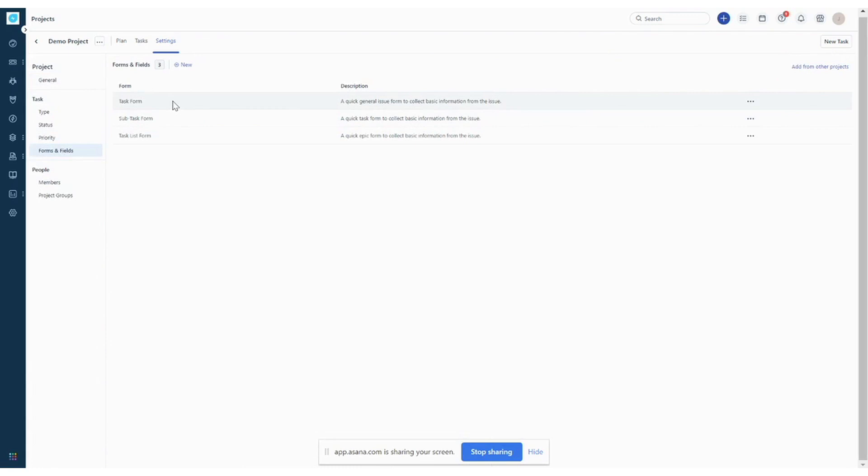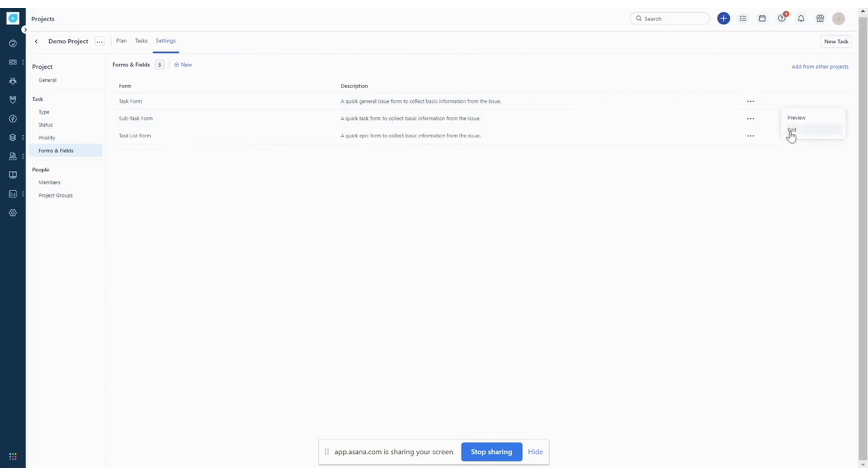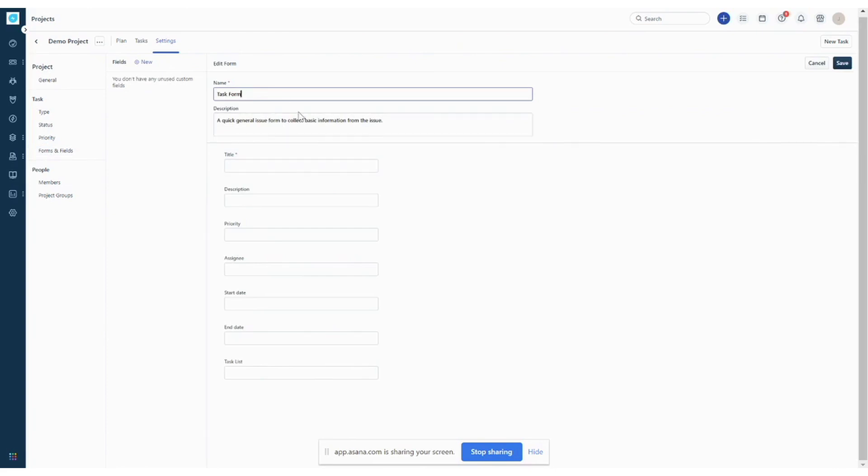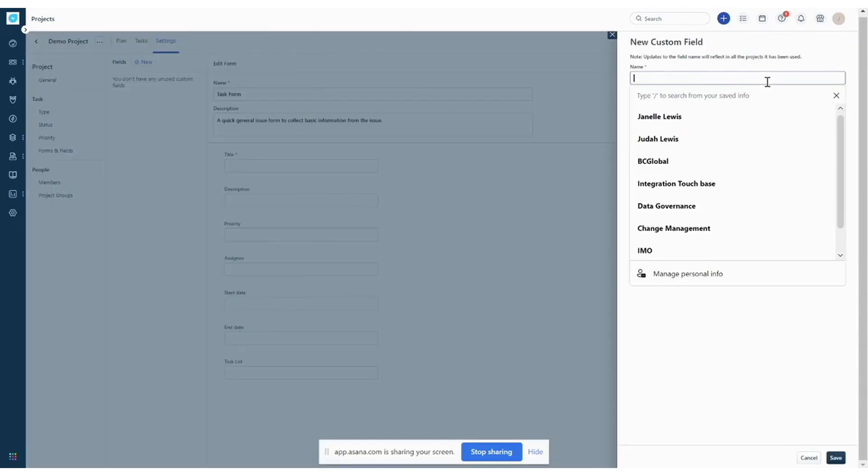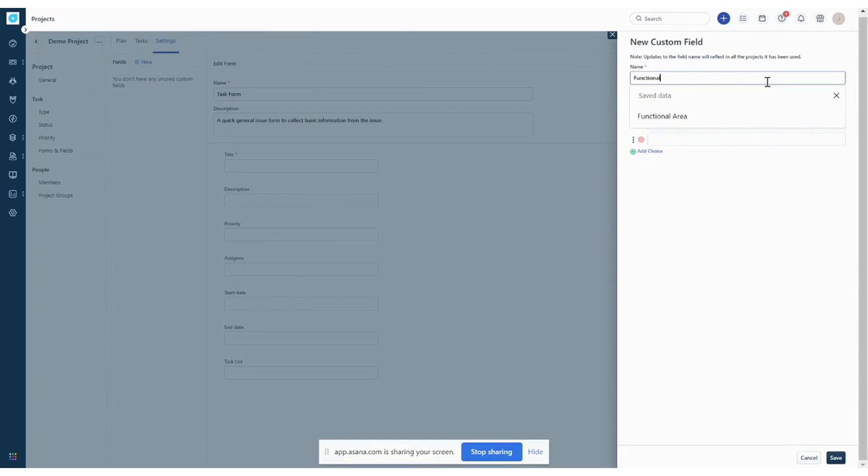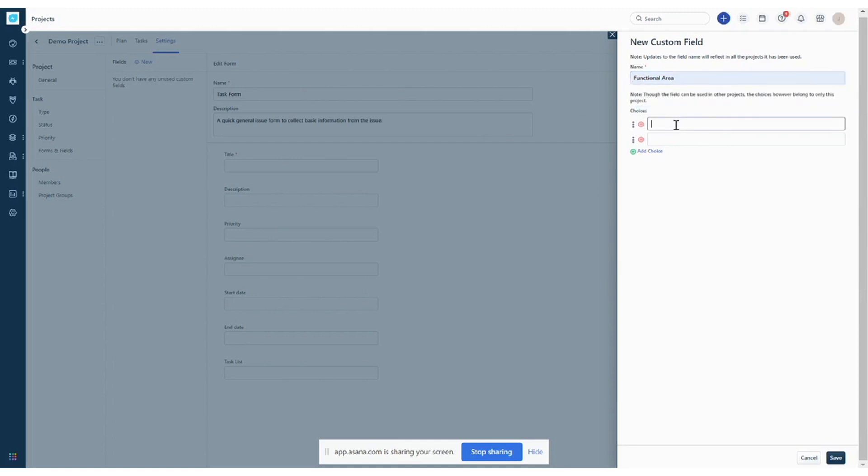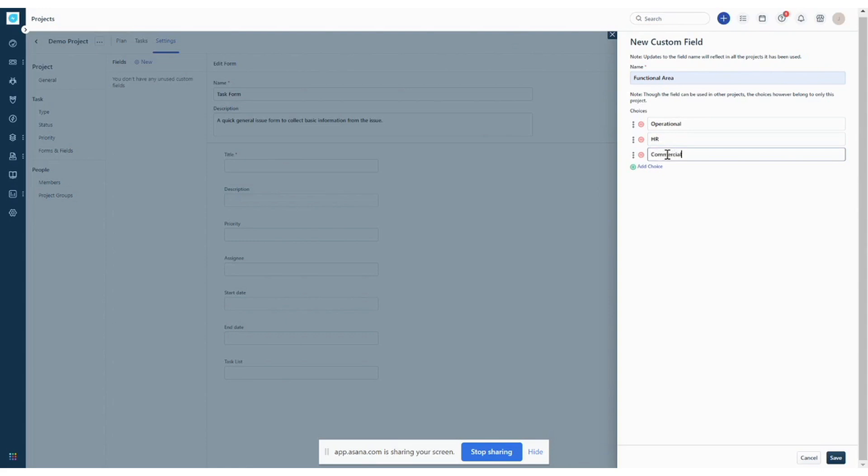And then as I mentioned briefly, if you want to add those custom columns that were in your Excel document to the project, it needs to be done here first before you import. If not, it won't pull over that information. So this is reviewed in the forms and field video. But just a quick recap. If you go to task form edit, you can create a new field and it can be in alignment with whatever fields are in your Excel document. So there was a functional area field and then we can start to add in the same functional areas that were in your Excel document. Hit the save button.